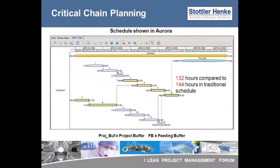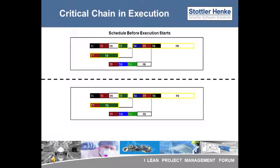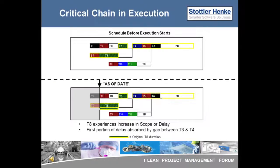Now we move on to how critical chain operates in execution. We expect things to not go as planned. As the project progresses, both tasks T1 and T7 essentially finish on time. After task T8 has been worked on for a time, an update is provided that estimates the remaining duration, showing an end time for T8 that is later than the original aggressive estimate. In this case, the delay is absorbed by the gap that existed between T3 and T4.